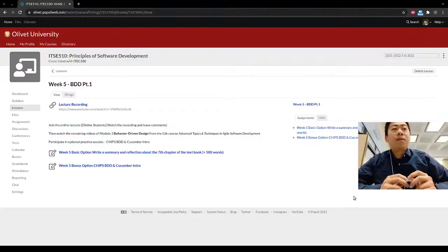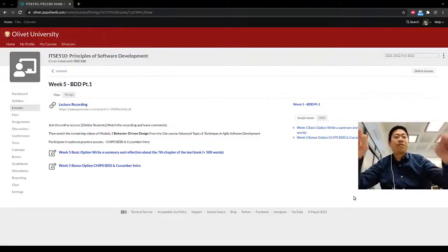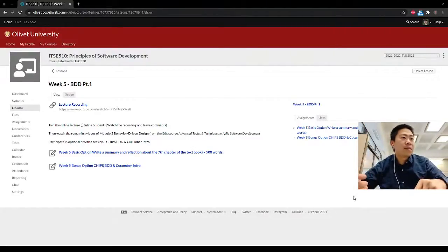So that's that about Pivotal Tracker. So you probably would have noticed that one of the main value propositions, or one of the features the Pivotal Tracker offers compared to other task management, is it actually helps you to estimate velocity, meaning instead of estimating how long each task would take, you simply just estimate the points, and then the Pivotal Tracker system will actually run the average and then calculate the average of time you spent on each point of task, which makes sense.